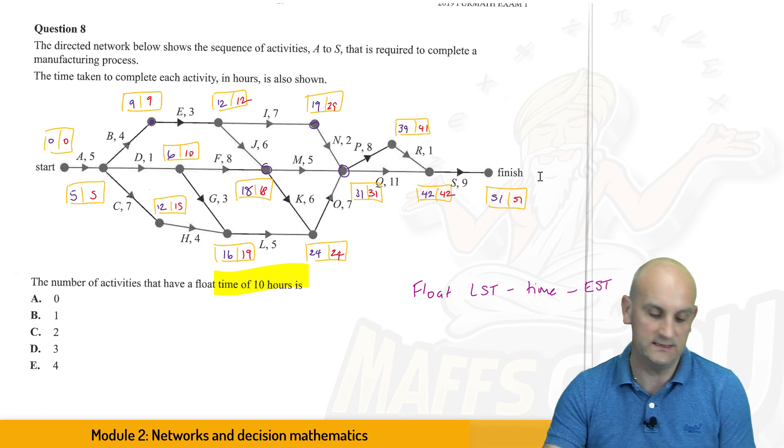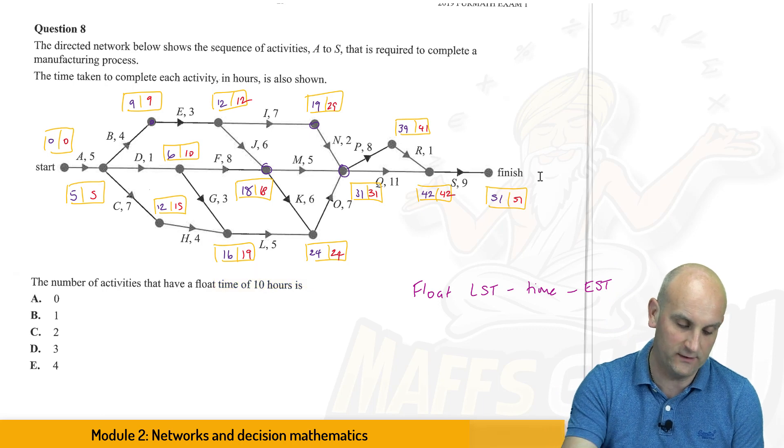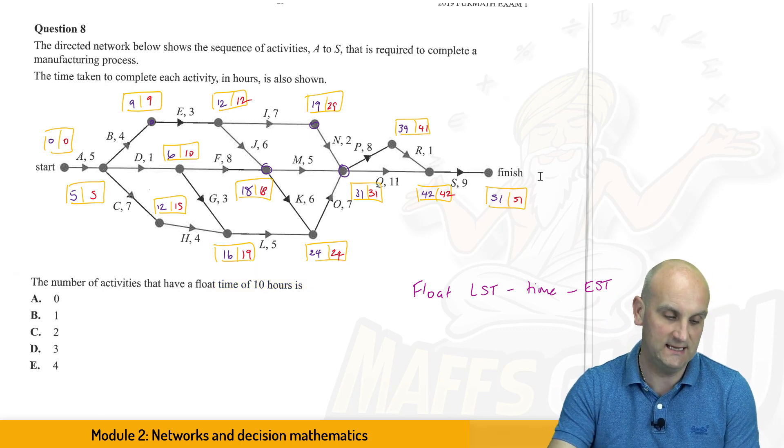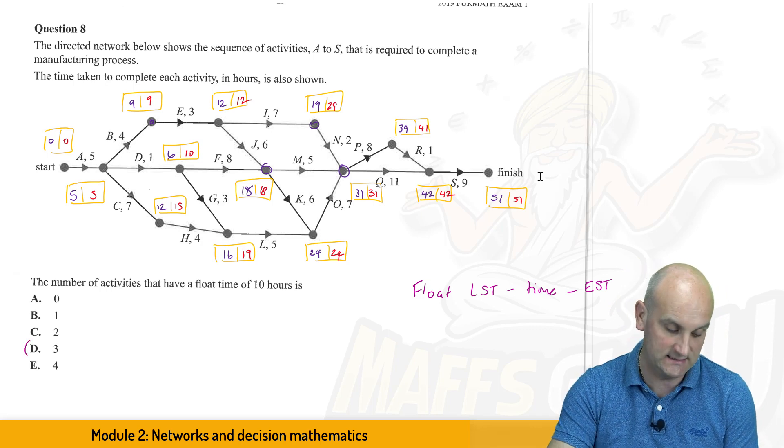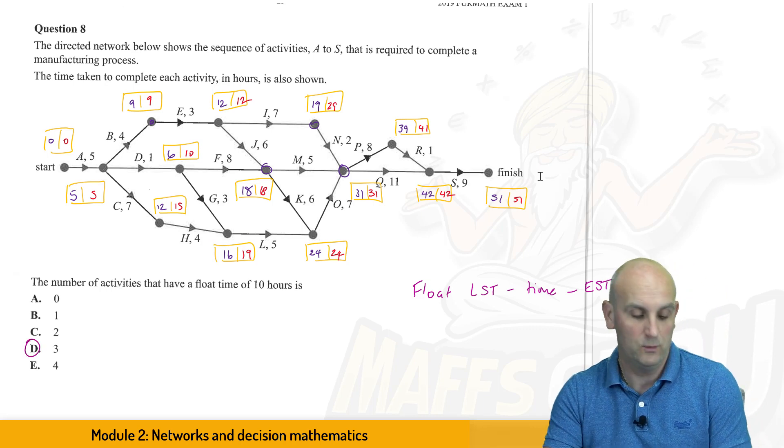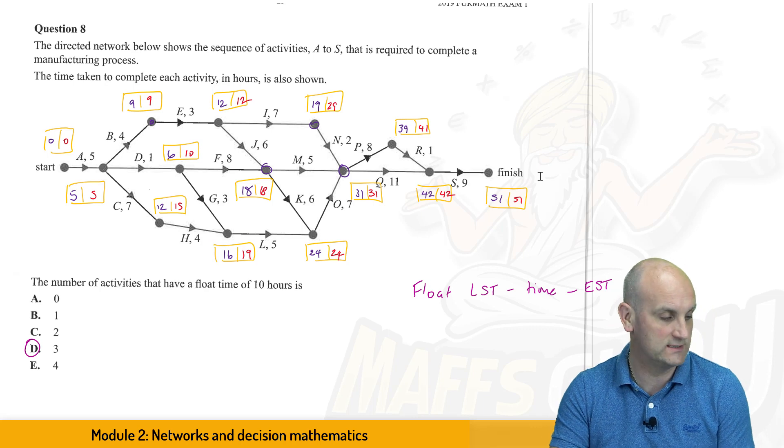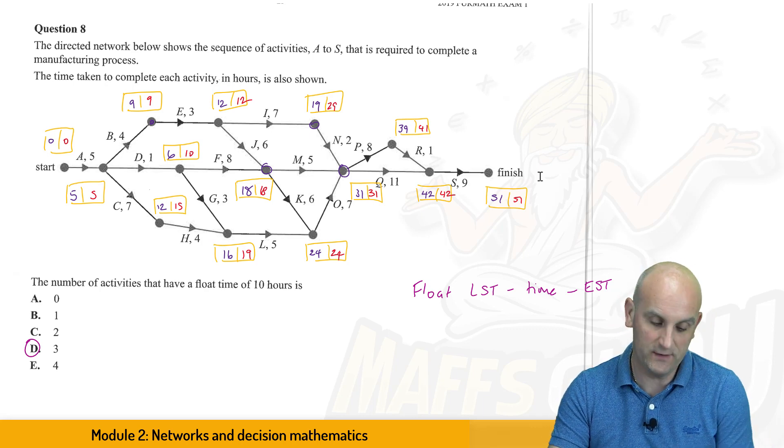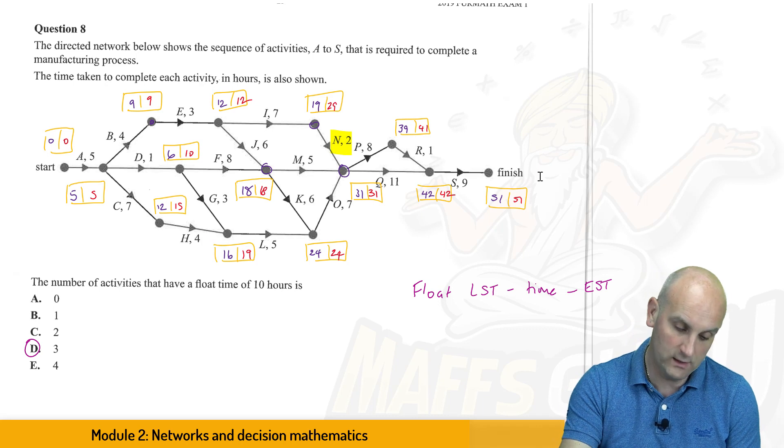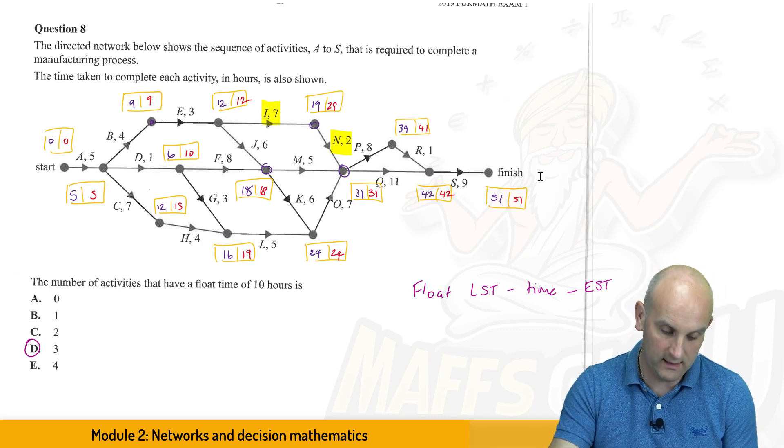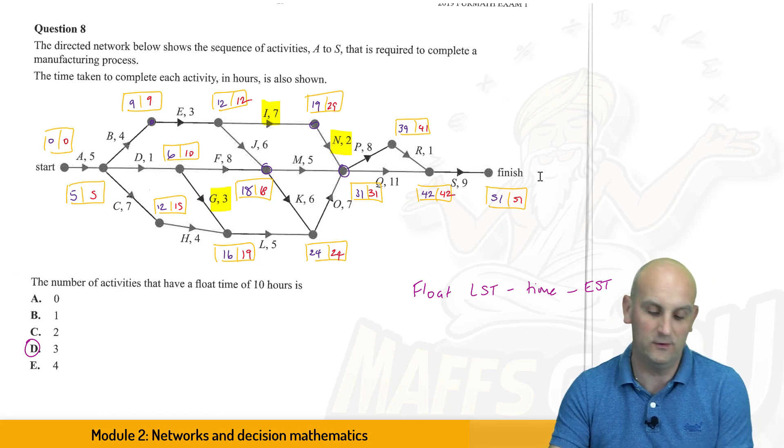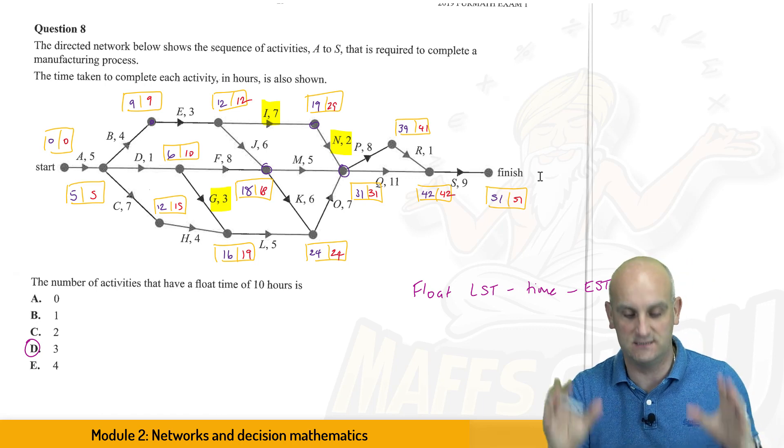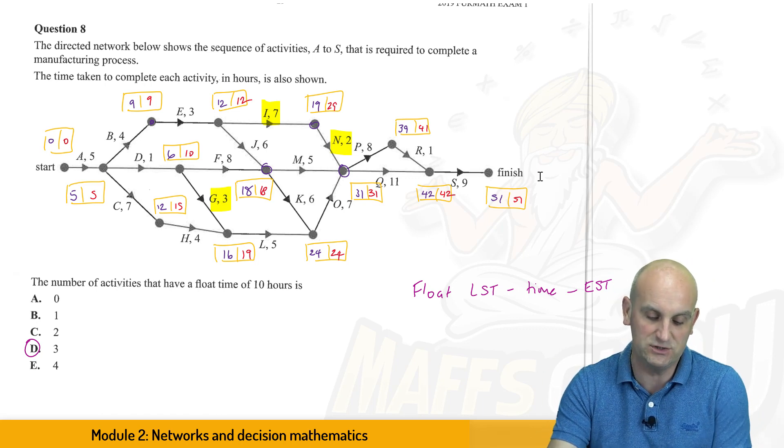Now, what actually turns out is if I take out that floaty thing there, what we notice is there are three of these. And I'm saying my answer now is actually D. There are three with a float time of 10. How do we know which ones they are? Well, first things first, we know that N is one. I'm going to show you why. We know that I is one, and I know that G is one as well. So let's just check the way we know. Now, obviously, nothing on the critical path is going to be a part of this, and so let's just check N.